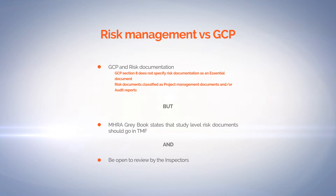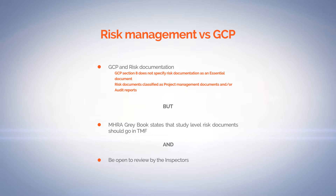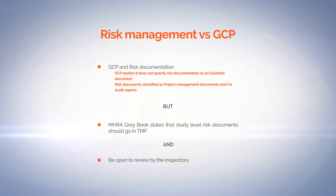When we first started doing these trainings and webinars, this slide was slightly different — until we met an MHRA inspector. GCP section 8 doesn't actually specify risk documentation as an essential document, because risk documentation wasn't around when GCP was first drafted in 1997. The risk documents are classified as project management documents or audit documents.